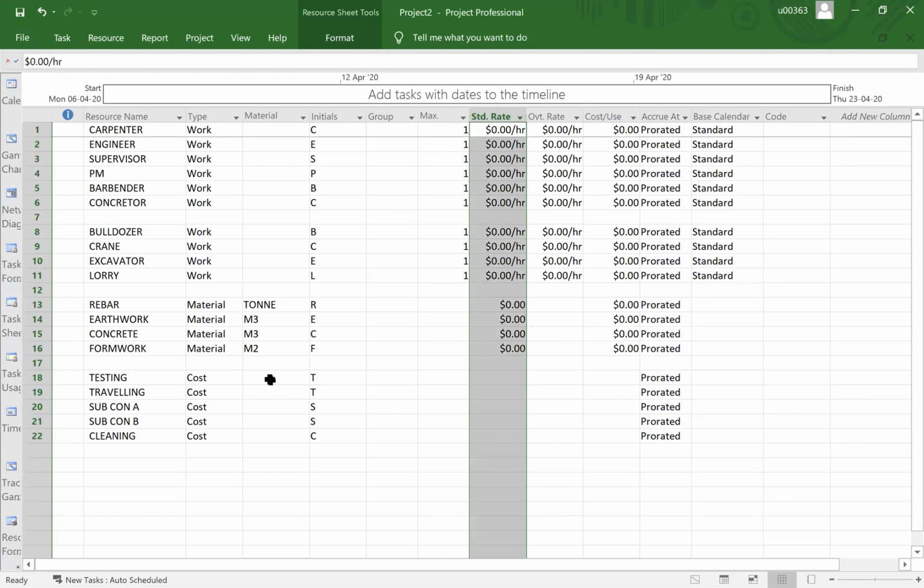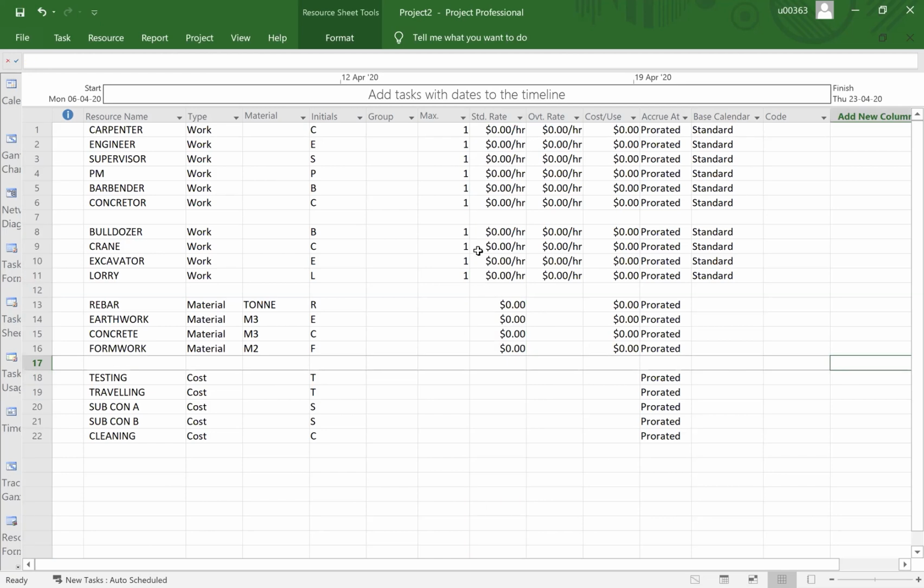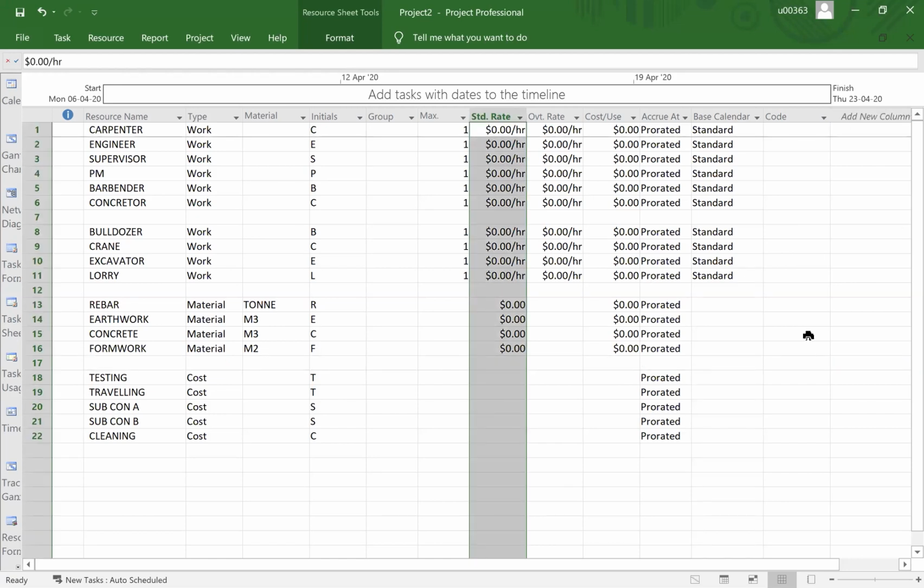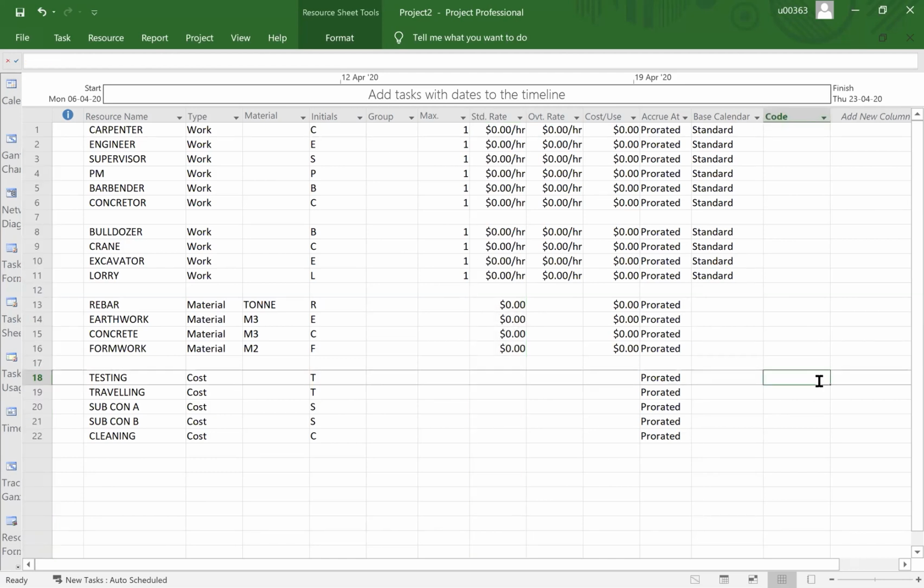Maybe I will input on the unit rate, as I mentioned to you. If you input the rate for carpenter and machine separately, at the end of the day it is very difficult because it might not tally with your tender value or contract value. So the contractor normally shows the cost in order to tally with the progress payment. So the cost should be equivalent to whatever is mentioned in the BQ or contract document.